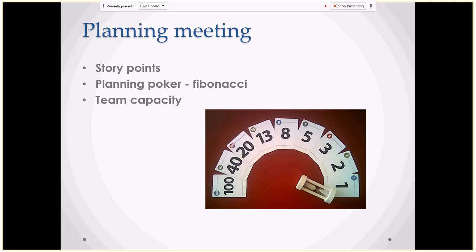And then team capacity. When the project begins, we wouldn't have an exact amount, because from the first sprint we wouldn't know how much effort we have. So in that case, you can estimate using the story points. You can consider the hours as the estimate. But from the second sprint itself, the second iteration, you can consider the first sprint. How much have you delivered? You might not deliver all the stories that you agreed on, but you would know at the end.